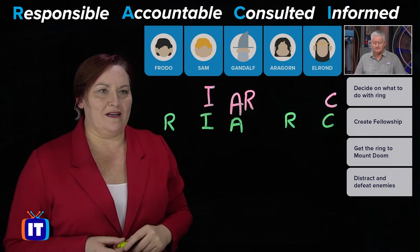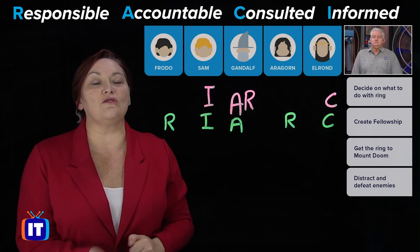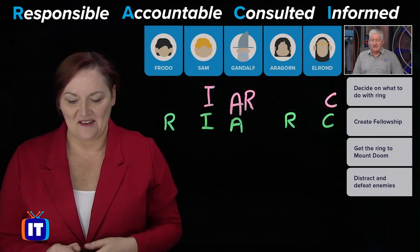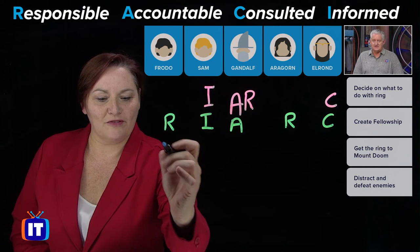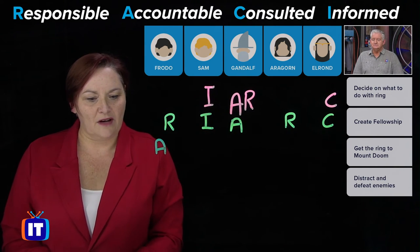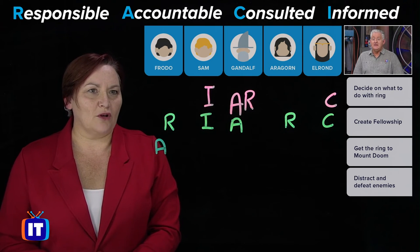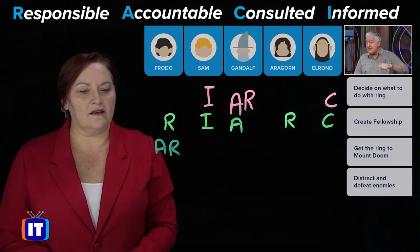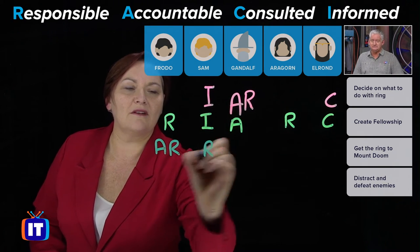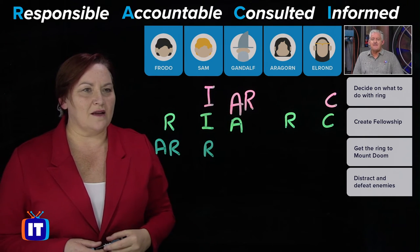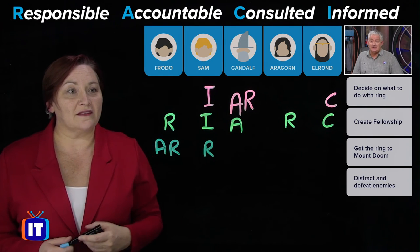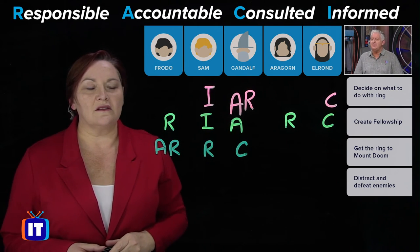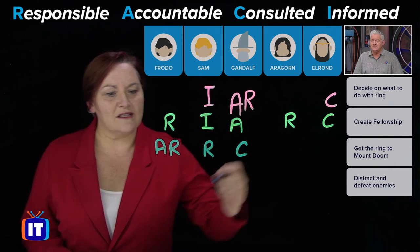What about getting the ring to Mount Doom? Who ensures the ring goes there? We're going to give Frodo his due — he's accountable. And he's also responsible, as is Sam, since they're going on the journey together. They're going to consult Gandalf, of course. And Aragorn is informed.